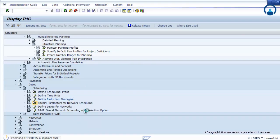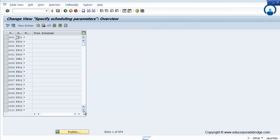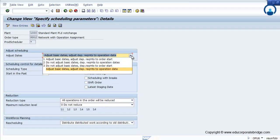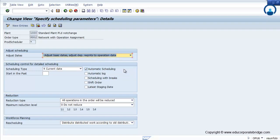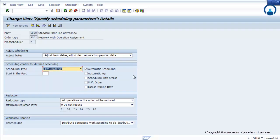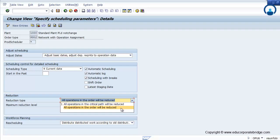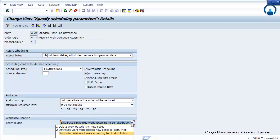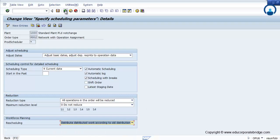Specify parameters for network scheduling — what kinds of scheduling parameters you want. Whether to adjust basic dates, as per forward or backward scheduling type, whether the system creates a current date, whether automatic scheduling is needed, whether automatic log is required, and whether scheduling with breaks is required. All operations in the order will be reduced using the reduction type, with maximum reduction levels L1 through L5.